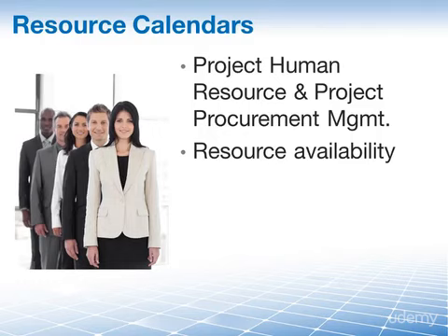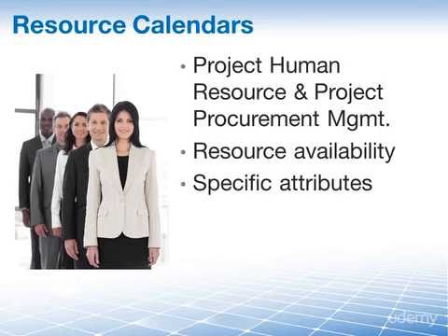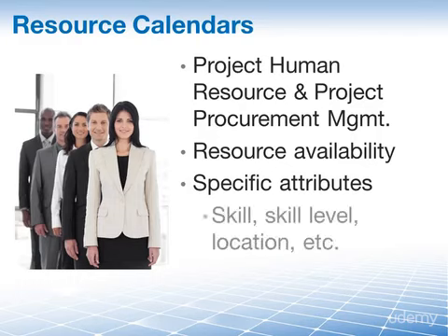Resources that need to be listed on a calendar are not limited to labor or people. Other common resources to include in most projects are equipment, work locations like conference rooms or work areas, and materials. The resource calendar has influence on duration due to specific attributes that it contains, because for most projects you need somebody to be available and not just anybody to perform an activity, where attributes need to be factored in.